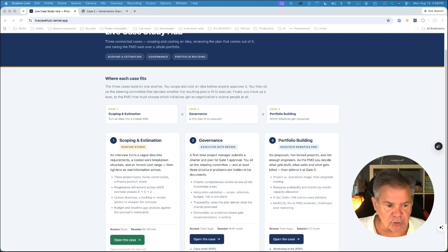Let's document them so they have the information to do that. After that, let's score them using the criteria provided by the executive committee, and then let's see, do we have the resource to do it? Okay, and that's pretty much the whole case. Obviously, the answer to this will be a recommendation on which project should go ahead.